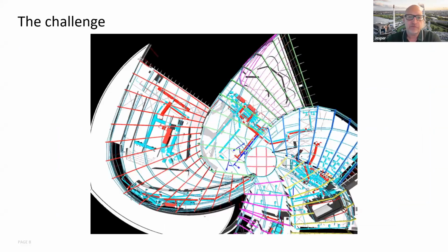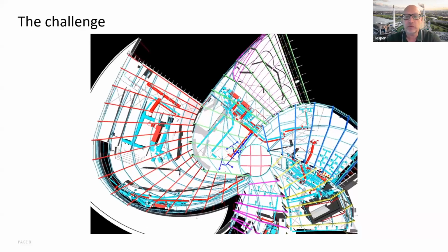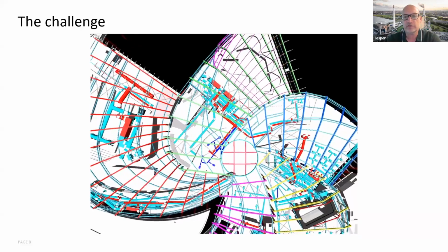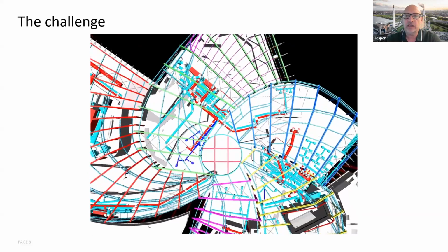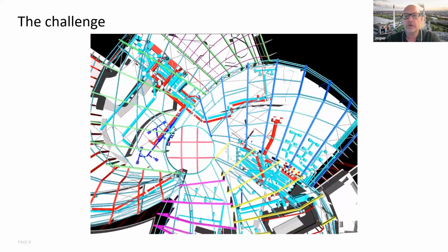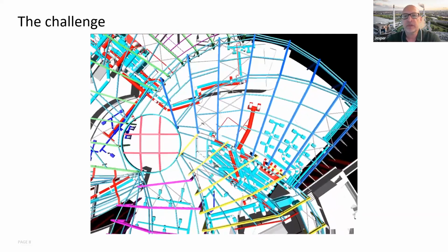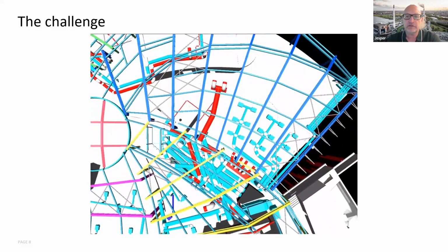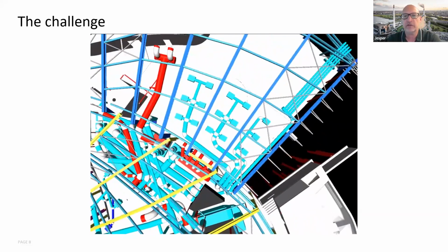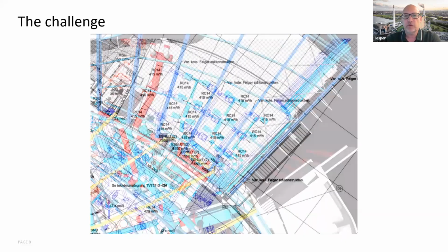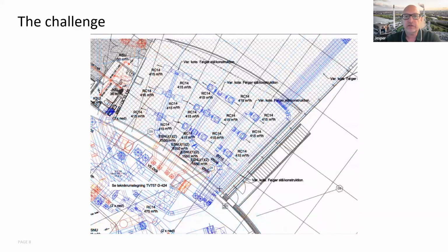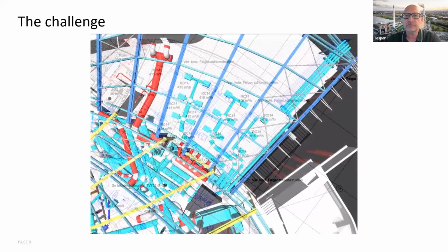And this is also from that project. As I showed you before, we were still communicating on drawings and not really communicating using the 3D models, though we had them. And this example is one of the places where it actually went wrong. Because if you look at the drawing of this ventilation plan, it doesn't show that one of the ducts is not horizontal.